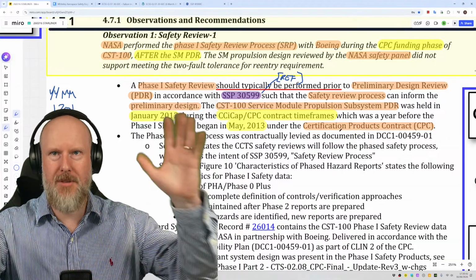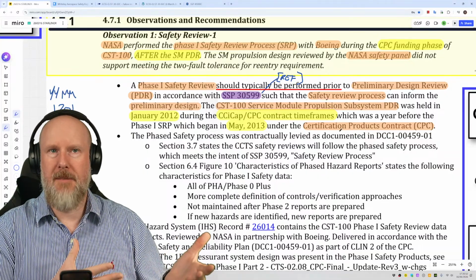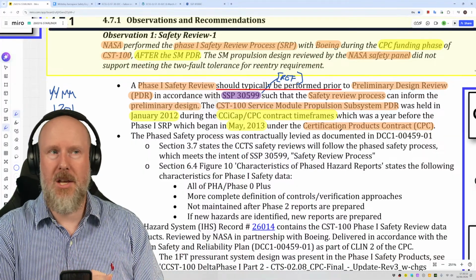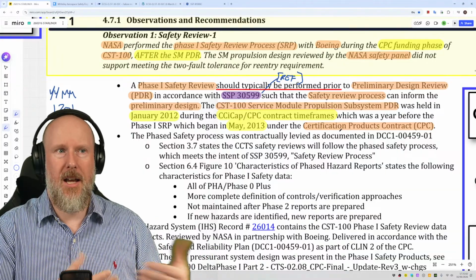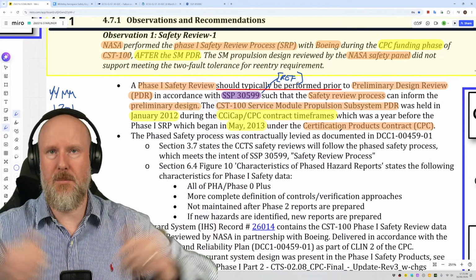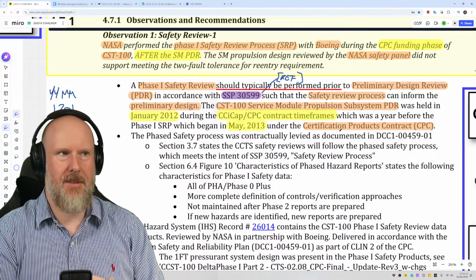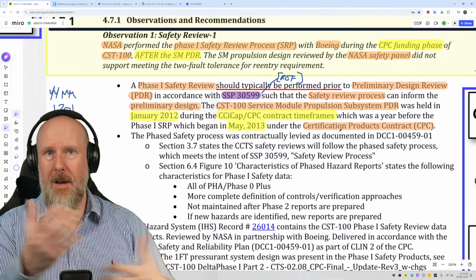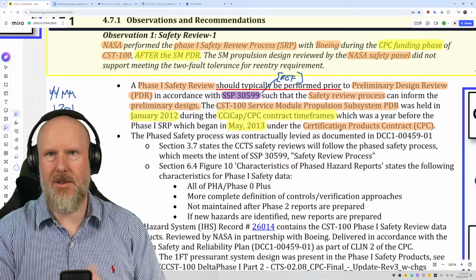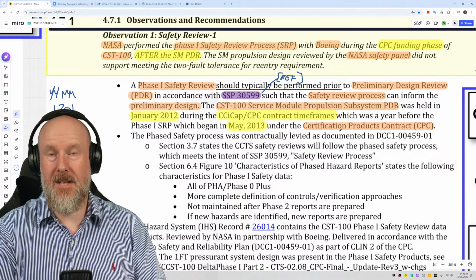And I've seen this quite a few times over the years, and it is incredibly frustrating when the project management team run off and get all the contract nonsense done without actually respecting that contract should have some level of involvement or influence from the safety process, such as if you've identified some hazards and set some safety requirements, or even if you haven't, you're able to say in the contract you expect the supplier to follow some kind of safety process that's robust and audited and everything else, and that if they do have any catastrophic failure conditions or catastrophic hazards, they need to inform you, and there needs to be an open and free exchange of safety-related information, and the contract itself should not undermine or cause problems for sharing of safety information and dealing with safety issues.